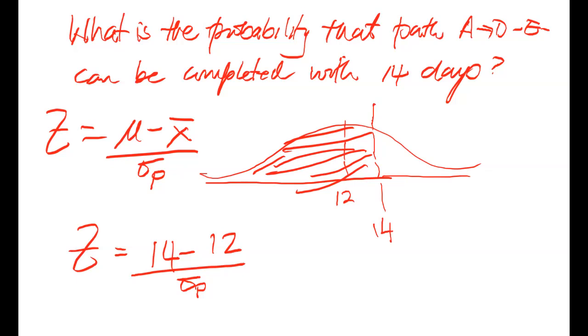Now, though it says the standard deviation of the project, you do not need to find every item in the project. What we normally do is find the standard deviation for the pathway activities, because those normally are a good proxy for the standard deviation of the project. So the question is, how do I find the standard deviation of the project? As I said, it's easier to use just the activities on the pathway you're being asked for, because that is usually a critical pathway and that controls how well you achieve the project. So it's a good proxy and that saves you time and effort.